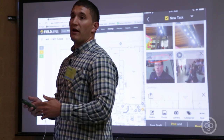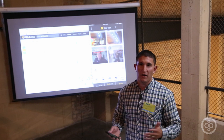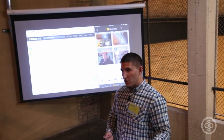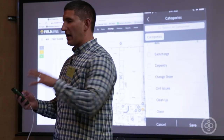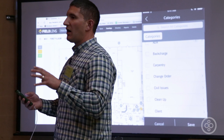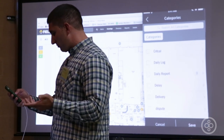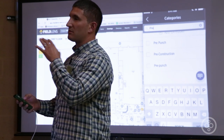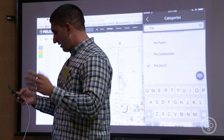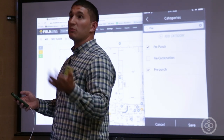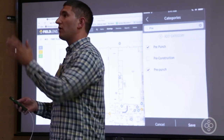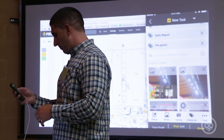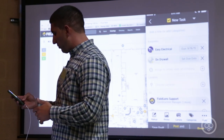Greg and I had an interesting conversation about the pre-punch process, which in my opinion is a tremendous time saver and a tremendous cost saver in terms of finishing punch list items 12 months down the road. These categories — whether it's a task, observation, or whatever — tell you what that information is. For example, it could be a daily report item or a pre-punch item or a punch list item. These are custom created by you — this is not me telling you what to do. You can apply multiple categories, for example a safety category and a fall or not-wearing-hard-hat subcategory to get additional data out of FieldLens.